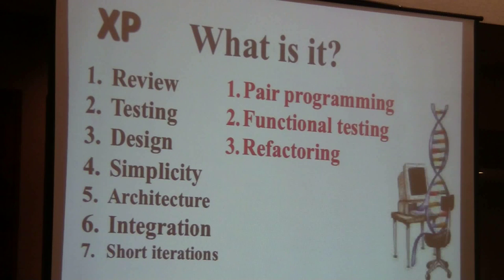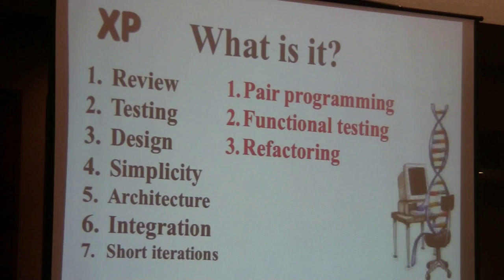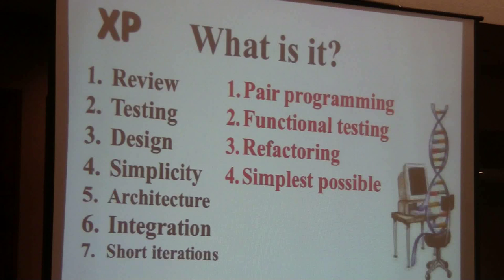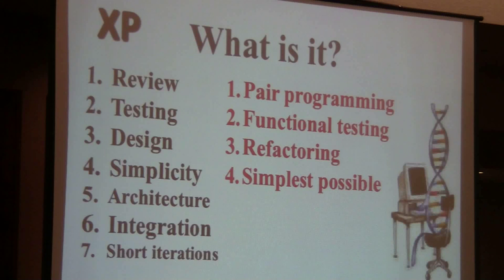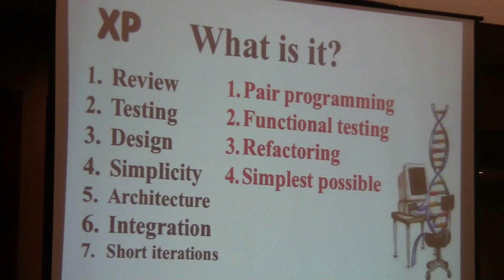Refactoring means you go back and test again. When you build the second module, you go back and test the two together. You pick the simplest possible design and find out the minimum requirement to succeed in a project — not the big project with all the bells and whistles. Build the minimum requirement, make sure you have it, do it in two weeks, then start adding the other things.